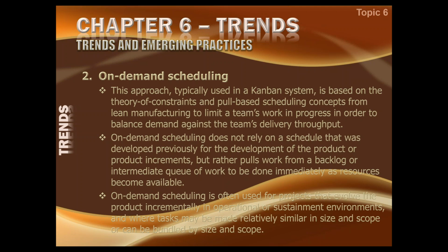So if it is such kind of a project in which you are producing similar kinds of products and a larger number of products, like in a production environment where you are continuously producing a similar kind of product, the Kanban is very useful. I am not saying that Kanban is most appropriate for the project, but it is most appropriate for the operations and production environment. But in projects also, we can make very good use of Kanban if possible.